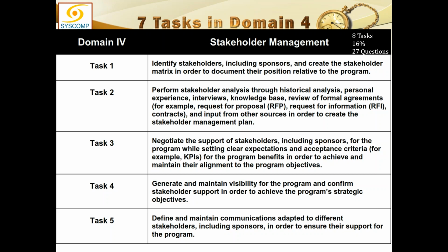Right. So we have to identify these stakeholders and we have to put them in proper matrices. Naturally, once we are analyzing these stakeholders, they must be properly assessed through their power interest grid or something like that. And later on, they must be assigned roles and responsibilities through a RASI chart or RAM or whatever. So these are the initial efforts for the stakeholders, that they are to be identified and put into proper brackets.